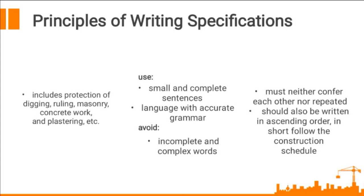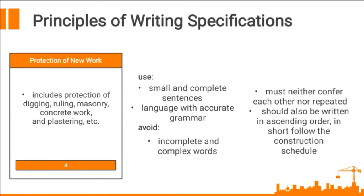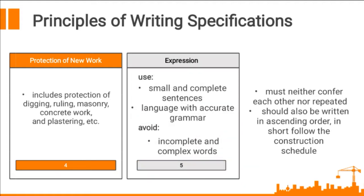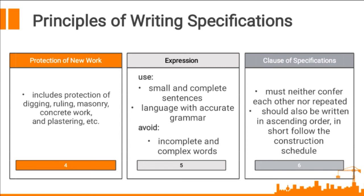Number four is protection of new work. It includes protection of digging — means to dig or break up and move earth with a tool or machine — ruling, masonry, concrete work, and plastering — means to cover a wall or ceiling with plaster, etc. Number five is the expression: use small and complete sentences, language with accurate grammar in order to understand it well, and avoid incomplete and complex words. Number six is the clause of specifications: must neither contradict each other nor be repeated, and should also be written in ascending order — in short, follow the construction schedule. For example, clauses related to excavation should come before foundation or footing.